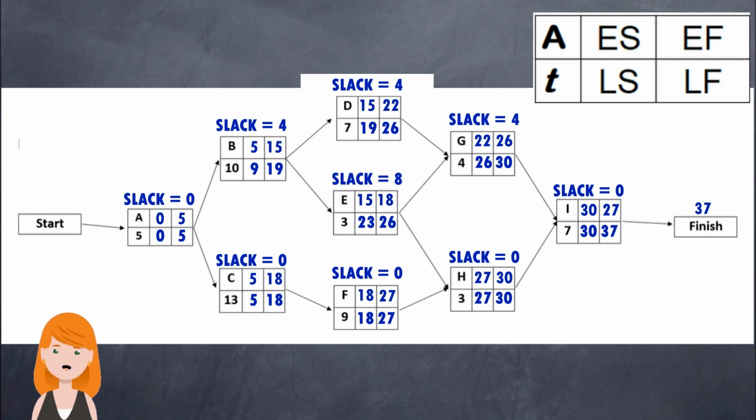And note, for example, that activity B can begin anytime between week 5 and 9, and it can finish anytime between 15 and 19.